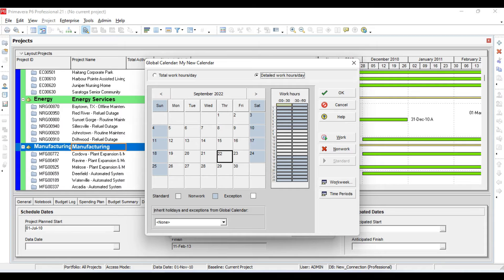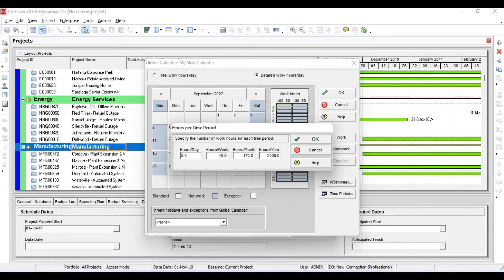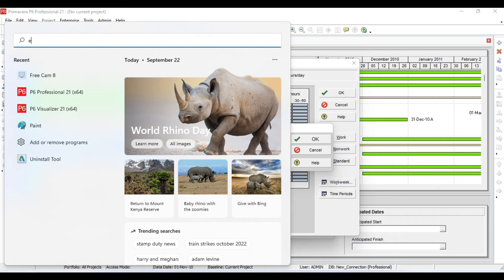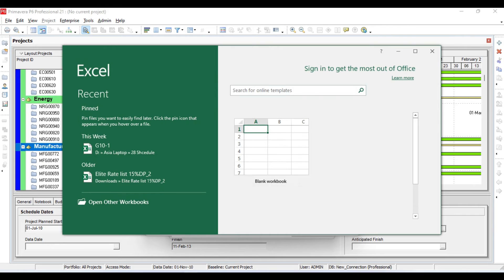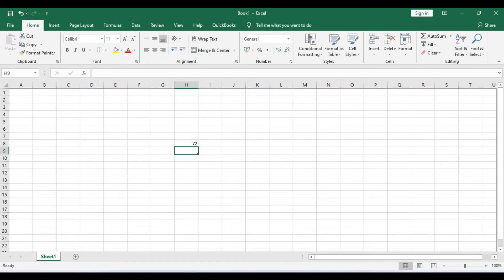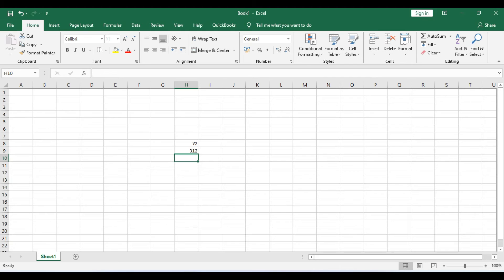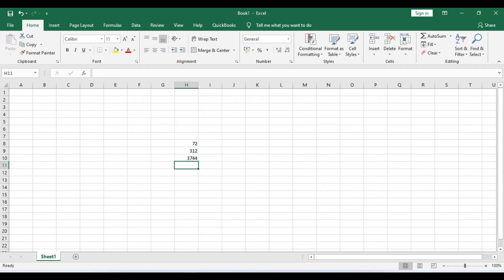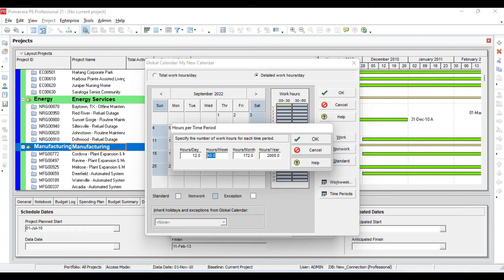First I will change it to 12 hours per day. If it is working 12 hours per day, then per week it will work 72 hours. There are 26 working days in a month, so per month it will work 312 hours. And there are 12 months in a year, so it will work 3,744 hours in a year. I will update these fields accordingly.